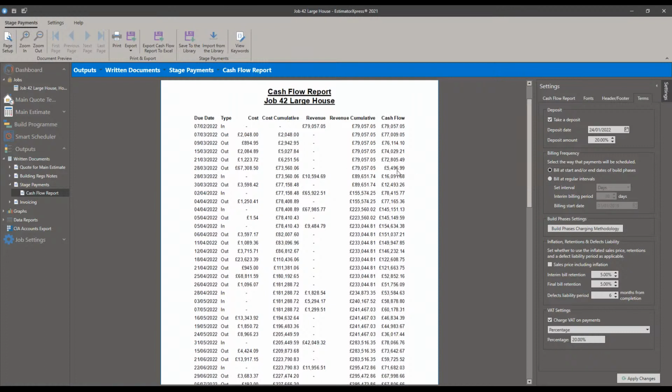My cash flow takes me down, because of my initial charge, to 5,496. It's low, but I'm not in the negative at any point, so I'm never funding the job. My deposit's high enough to make sure all payments are covered with a little leeway, say £5,500.